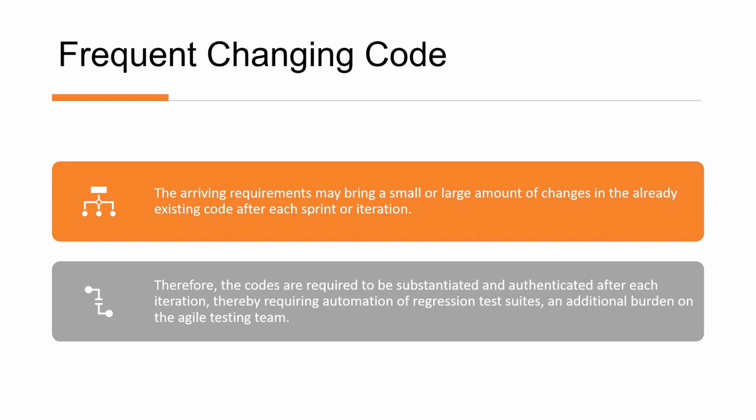So once all the changes are done in the already deployed code or application, the team is going to verify the impact of these changes through the requirements traceability matrix so that they can change the test scenarios accordingly and retest everything in the application that they have changed as a part of that change, and then it will be rolled out to UAT and after that to production.